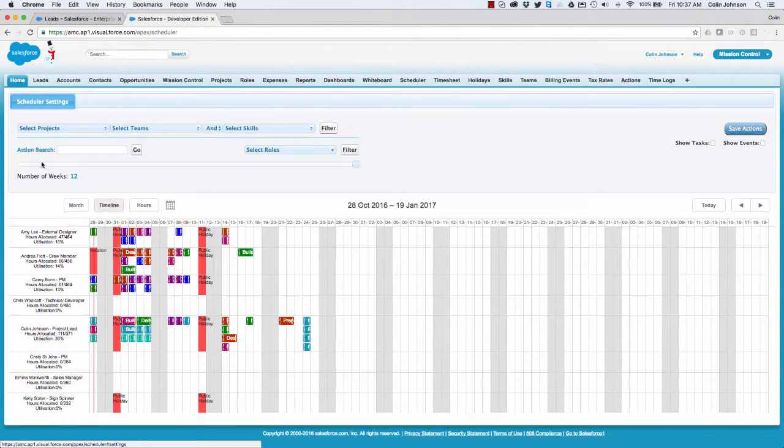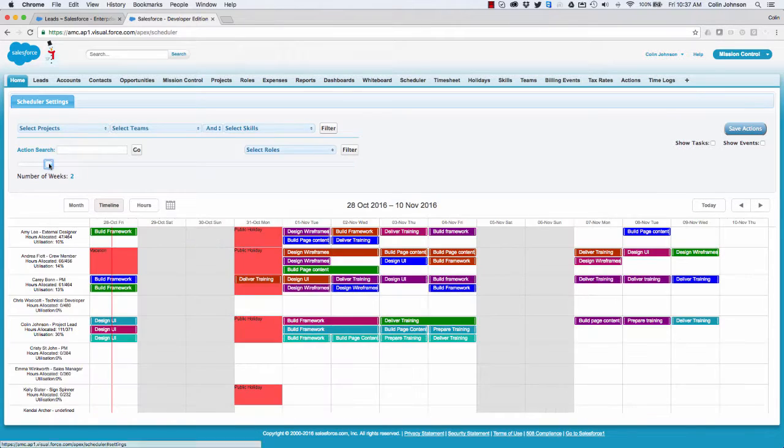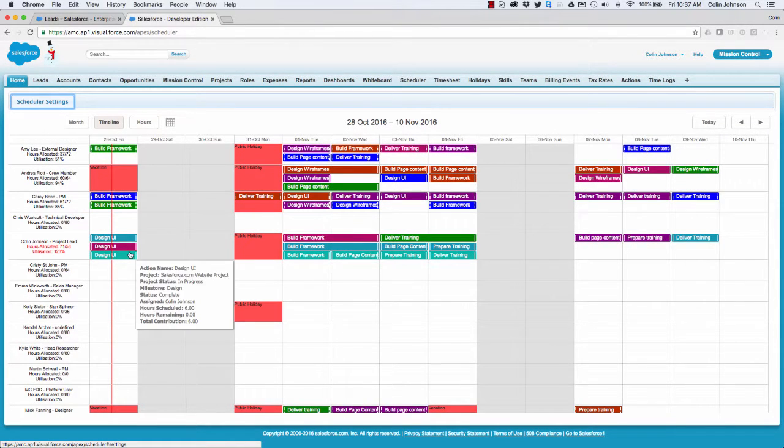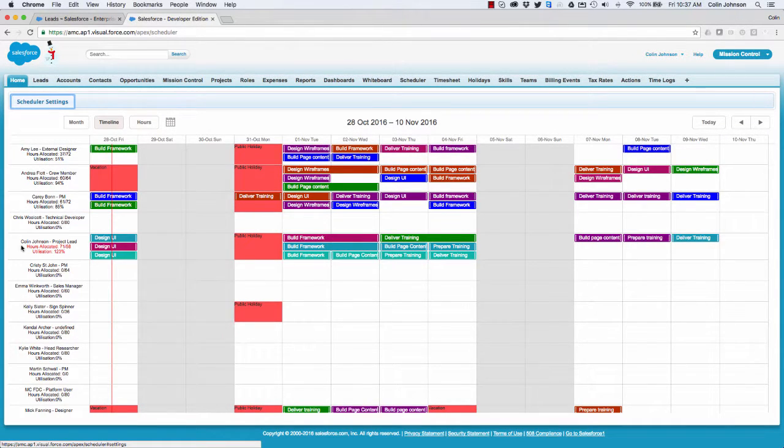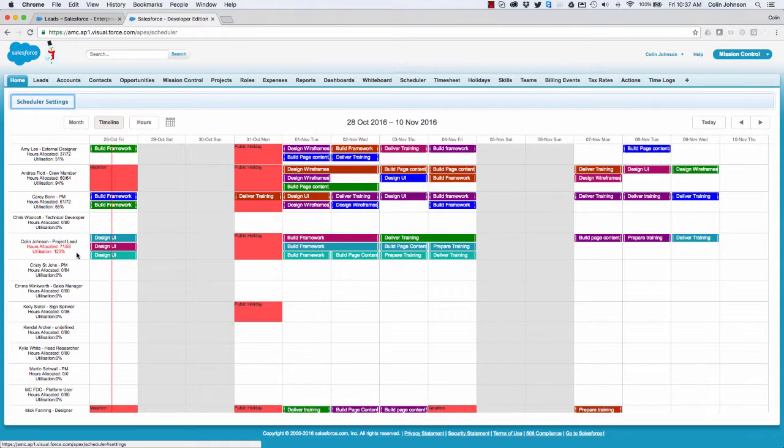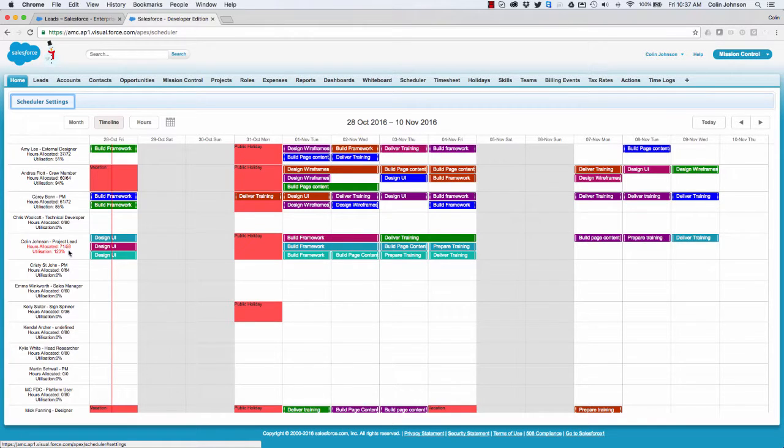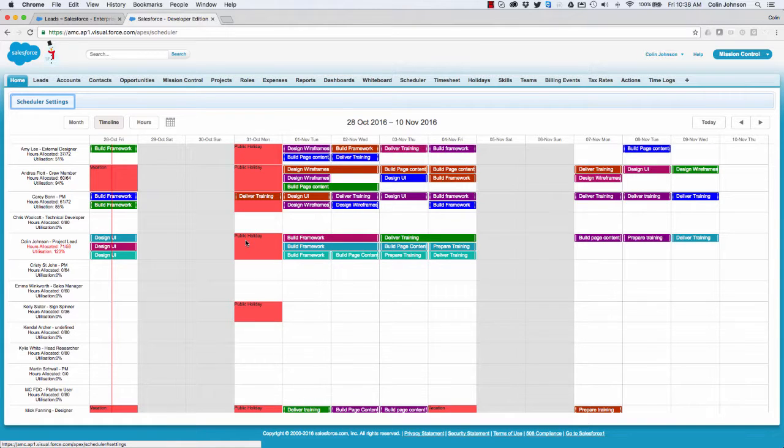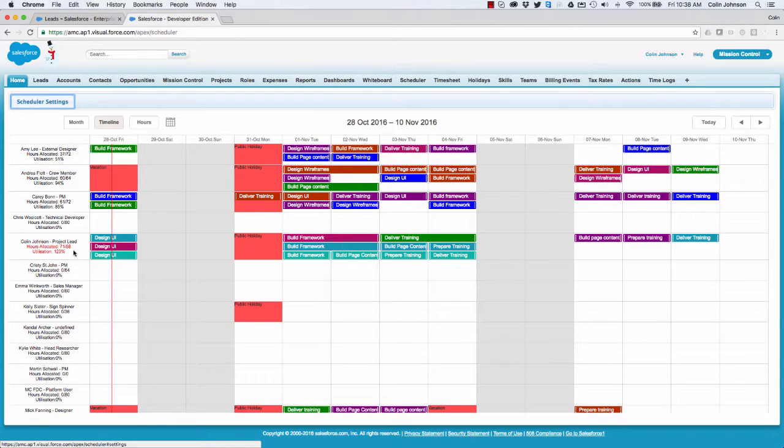So if we drop that back down to two weeks and take a look, what this is showing me is as a project member I'm available 32 hours a week to work on projects. So over this two-week period I should have 64 hours available in order to work on projects. But it's picking up that I'm on a holiday here, so what it's doing is automatically recalculating the available hours that I have to work on projects down to 58.